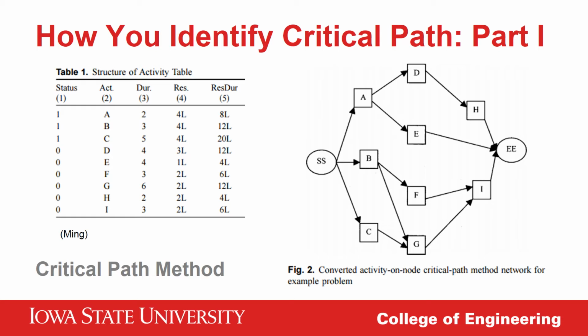Often with this type of diagram, the user will write the activity length right on each arrow on the flowchart. For example, both arrows coming out of the node A box would have the number 2 attached. The user then adds up the numbers of each arrow along the different paths, and the longest one wins, or becomes known as the critical path.